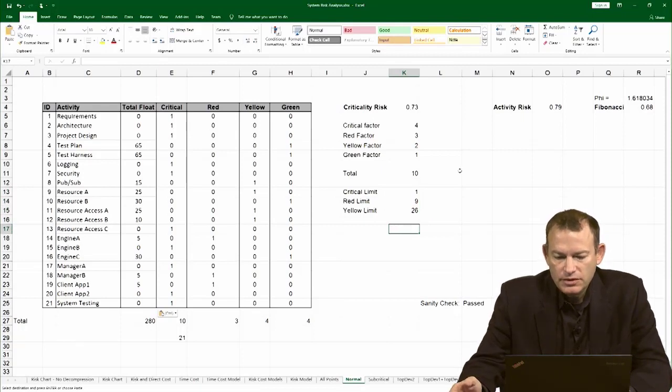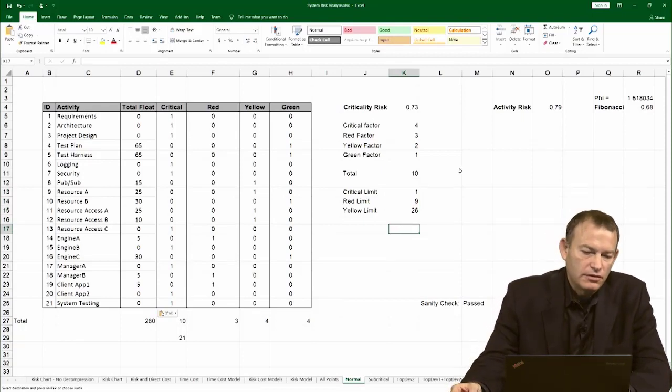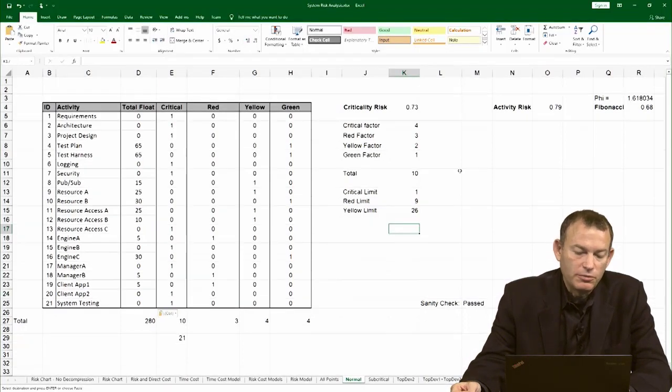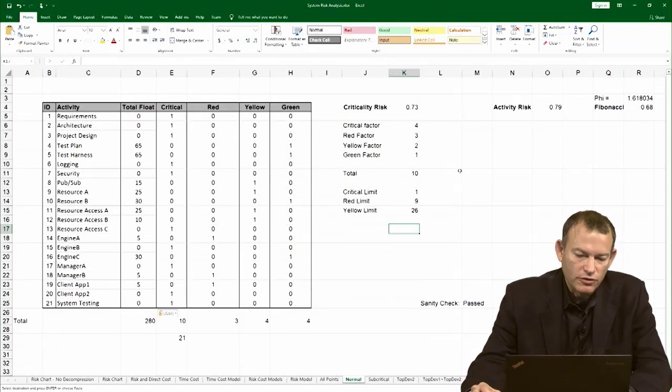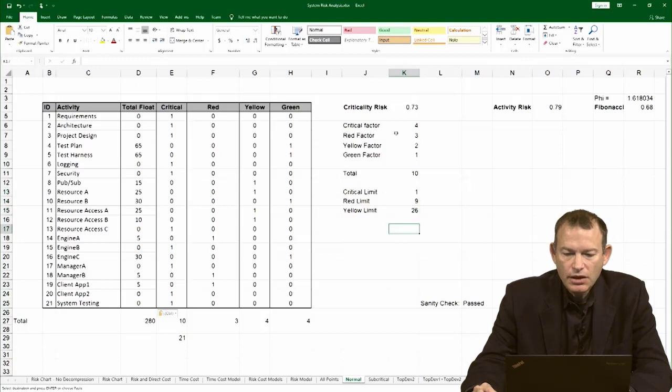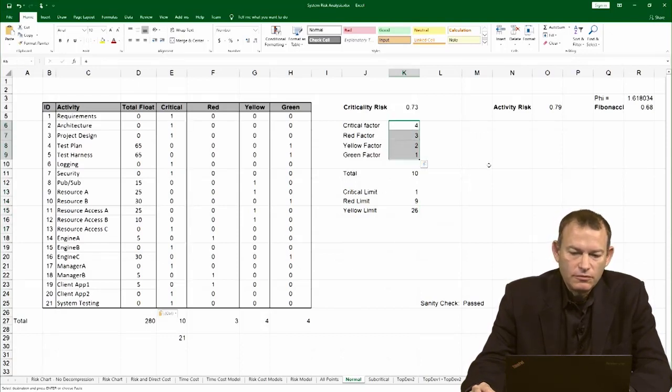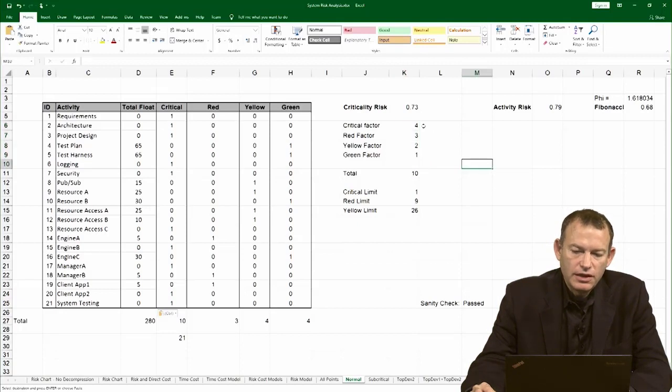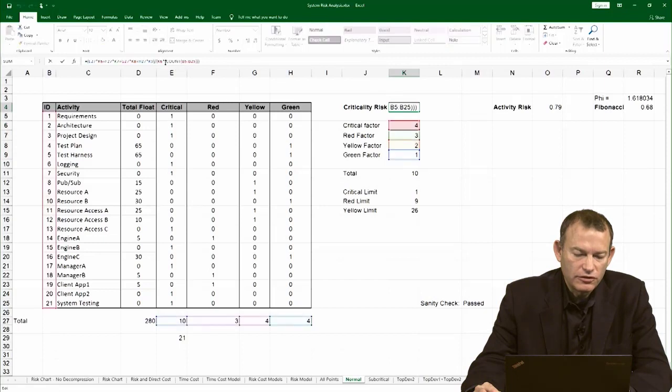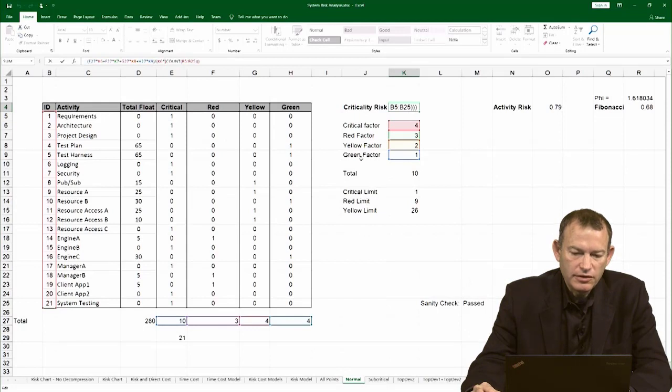10 days of float could be green on a three-month project but could be red on a one-year project. So this is somewhat project dependent. In addition, you have to give it the weight - what is green, what is red as far as the weight. That's basically what you do in this section. The rest, the spreadsheet does for you. Here's the risk calculation. It classifies all the activities based on the limits and calculates the risk.